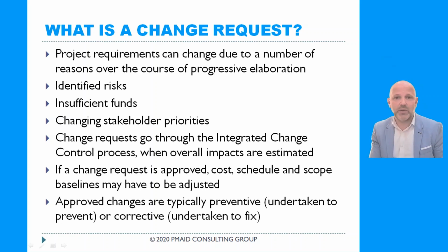Somebody says, we want to implement a new feature. Okay, so we decide if we can or cannot implement that feature. How much extra time will it require? Will this extra time impact the overall duration of a project? Will this extra time impact our costs? Can we absorb the costs or can we not? So all those things need to be considered. Are there any new risks that arise as a result of this implementation?